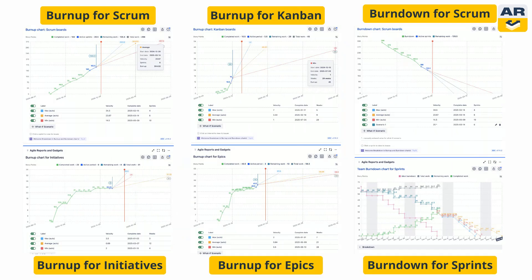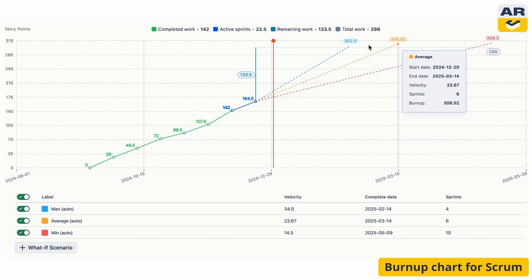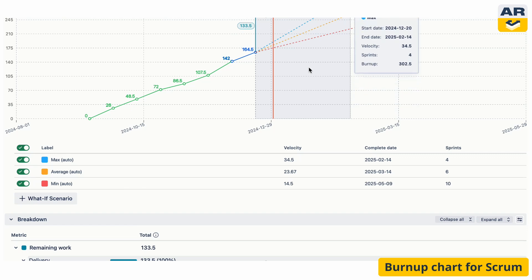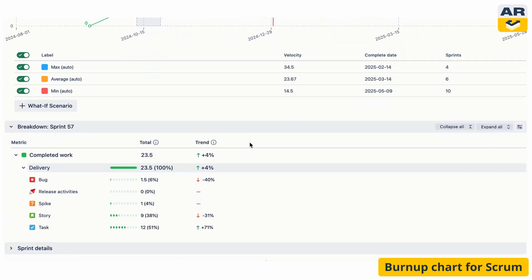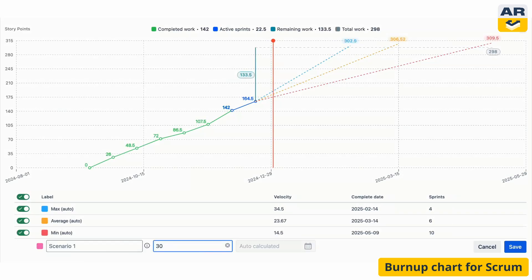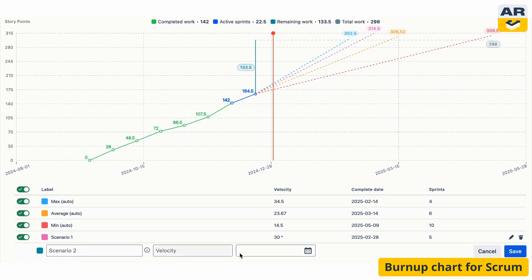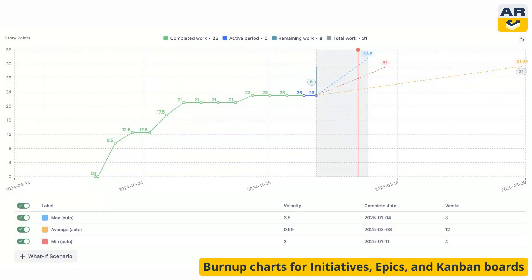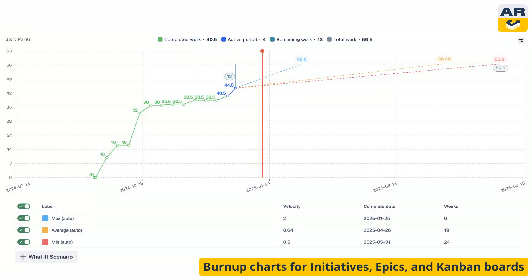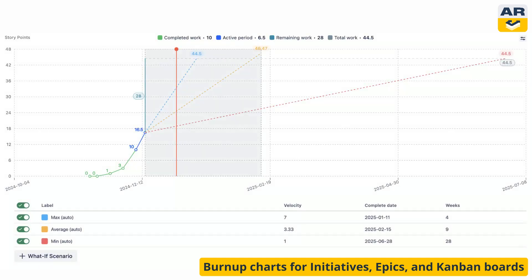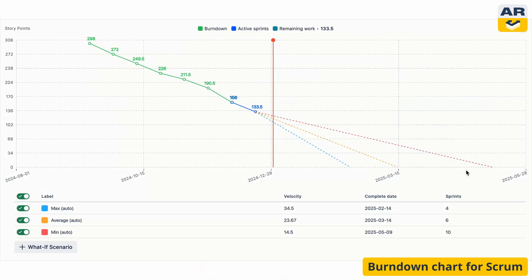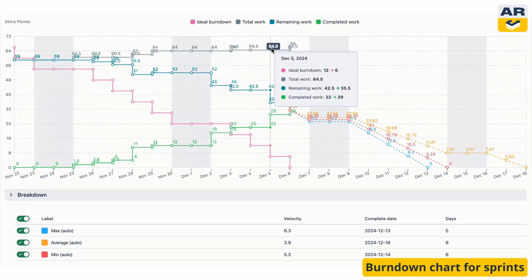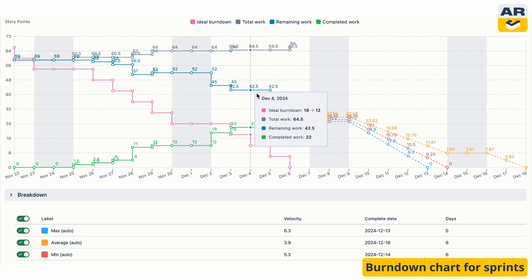Next, let's review the burnup and burndown charts that Agile Reports and Gadgets provide. Burnup charts help you predict delivery and keep track of progress. Just like the velocity chart, you can break down remaining or completed work into three levels of your choice. Use automatic calculations or play around with your own scenarios based on velocity and completion dates. There are separate charts for epics, initiatives, and Kanban teams. The burndown charts show you three standard outcomes for the remaining work and let you model your own what-if scenarios. The sprint burndown chart is perfect for daily stand-ups, showing you exactly where you stand against your targets.